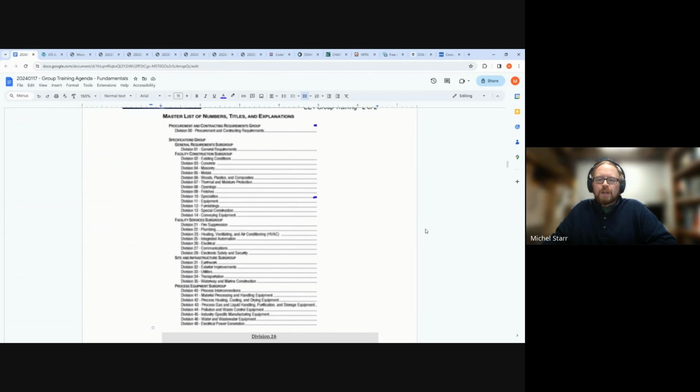And that scope of work usually references these division numbers to split up the work, but it's based on how they're going to procure the project. Maybe the owner team has particular vendors, or they themselves are going to perform work. So it doesn't make for every project being issued the same. So there are scopes of work documents that are usually within the appendices of the bid event.